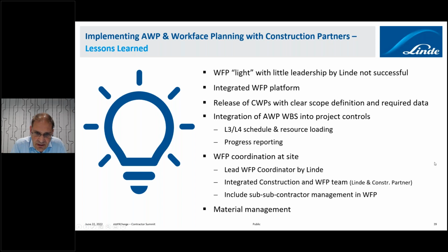Workplace planning coordination at site, as I said, that we have the workplace planning coordinated by Linde, that the construction organization workplace planning team is really an integrated team on both sides, Linde and our construction partner, and very important also that subcontractors, including fabricators, are part of the workplace planning. And last but not least, I'd summarize material management, so that this is closely integrated. So that is what I wanted to convey.